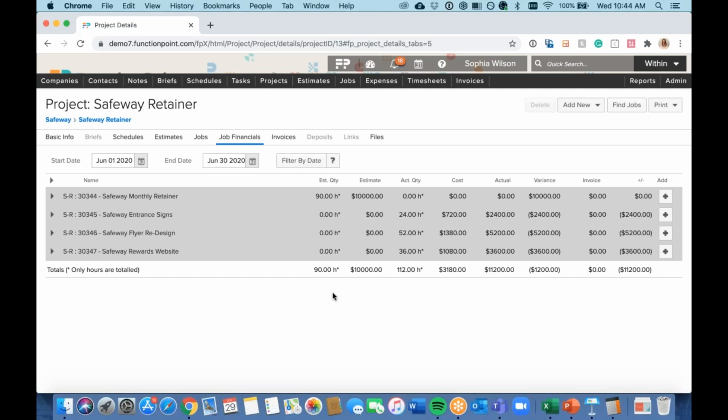Again, I would probably have about 20 questions for you, deciding on the best way to go about it. But just off the top of my head, a good way to do that, we could just rename that previous simple retainer. If this is the case of that single super simple retainer that we had done at the very start, store that underneath a project, and define maybe the months that it was associated to. If we know it's from January to June for that first 6 months of the year, then for the second one, we would start that billing retainer for those remaining months. And you would want to close that previous simple retainer and open up a new one.